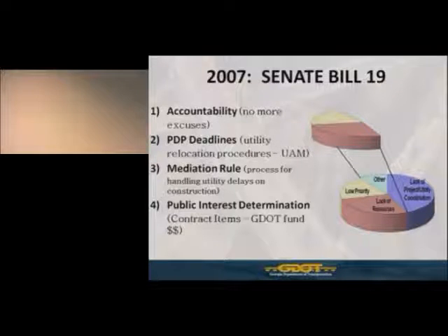Other projects, during various milestones, field plan reviews, etc., are reviewed by multiple parties within the department, and depending on the complexity and the potential risk for delays as it relates to the utilities involved on the project, a project may be valued as a PID. In other words, it would be less risky for the department to fund the utility relocations if they're included in the contract than to let the project and have the utilities do the relocations on their own and risk potential delays to the construction and completion of that project. I'll discuss each of these in greater detail as we go through this today.